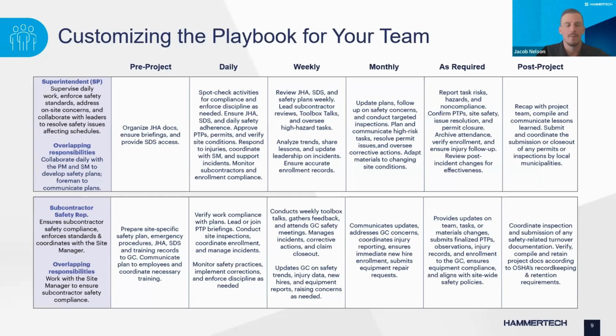Internally for us, we called them pre-flight meetings, and we would hold a team meeting. Externally, we called them kickoff meetings, but these were the things that we were reviewing. Some other things we would discuss are the high-risk activities, but we're also bringing in the safety and operational lessons learned from past projects, and walking through in detail those one-off scopes of work. A lot of the time you'll uncover gaps, like gaps in training or scope gaps, or particular subcontractor needs in which somebody is expecting somebody else to do it. The other party is expecting them to do it, and it just gets missed.